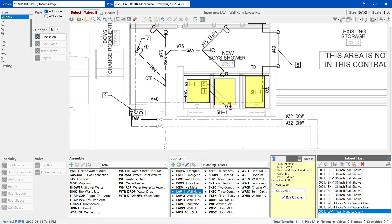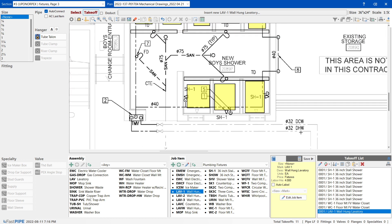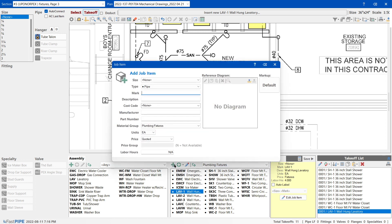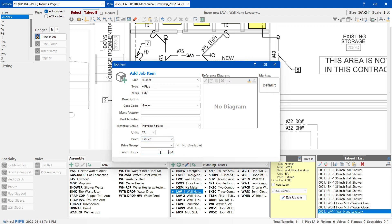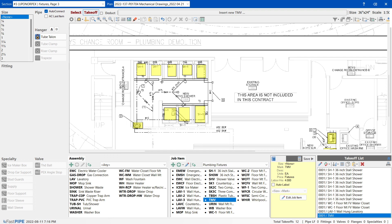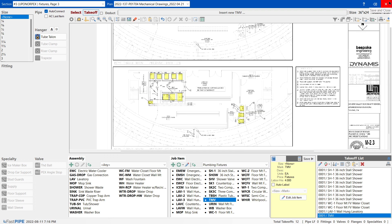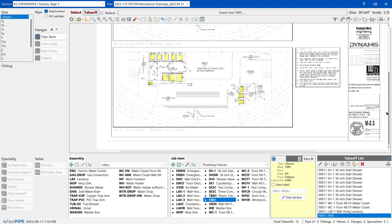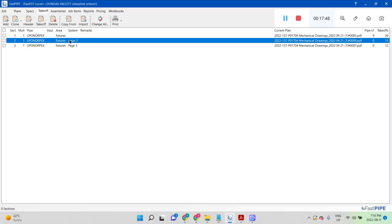Let me just make sure I didn't miss anything. There's a TMV - it's called a temperature mixing valve. I'll just go for four hours - if I'm not sure I'll just go for four hours for anything small. When the estimator comes he will check it. So I write 'temperature mixing valve', it's installed, it's done. Now all my pages are done.